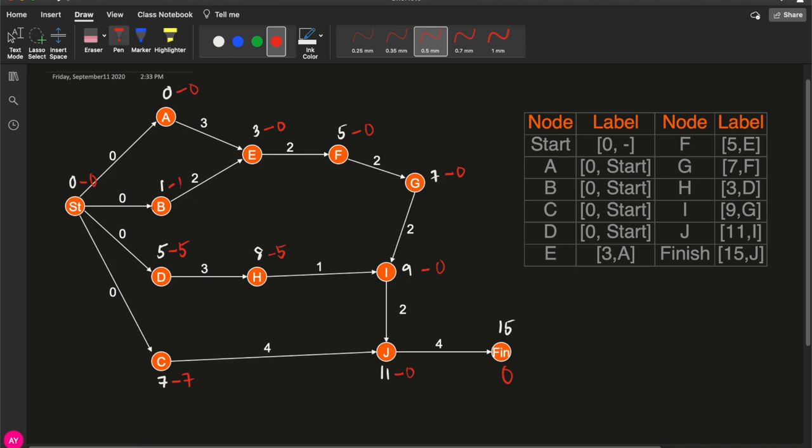And I hope it is clear here that the activities with a slack of 0, so let me encircle, are actually your activities that compose your longest path. And that is why the longest path is also called the critical path. Why is it called the critical path?